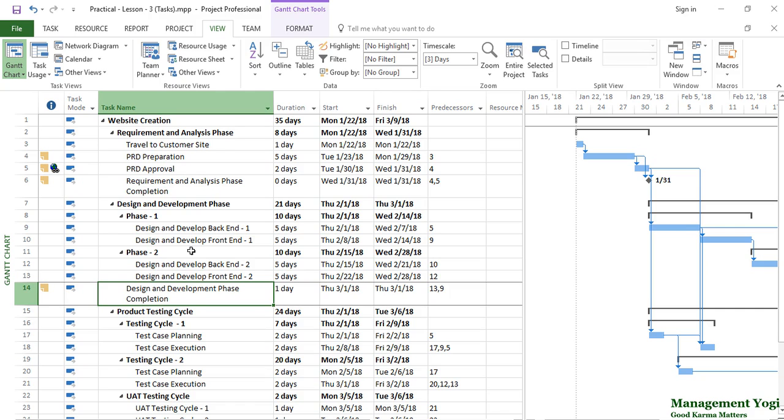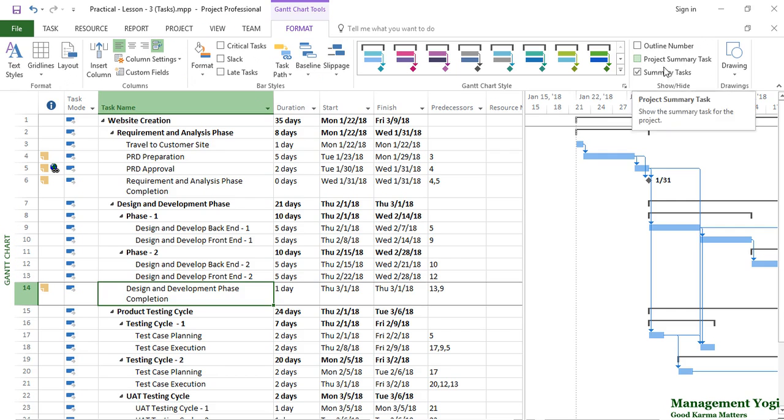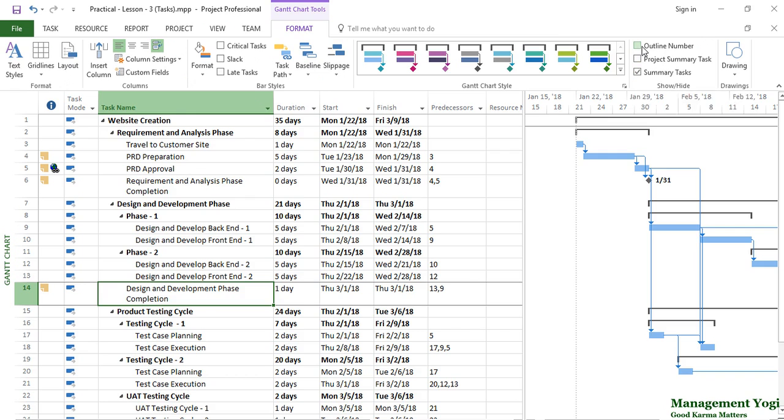To see the WBS ID, or as Microsoft Project calls it the WBS code, we have to enable a command. Go to the Format tab in the Gantt chart view, then go to the Show/Hide group. Under that we have three options: outline number, project summary task, and summary task.